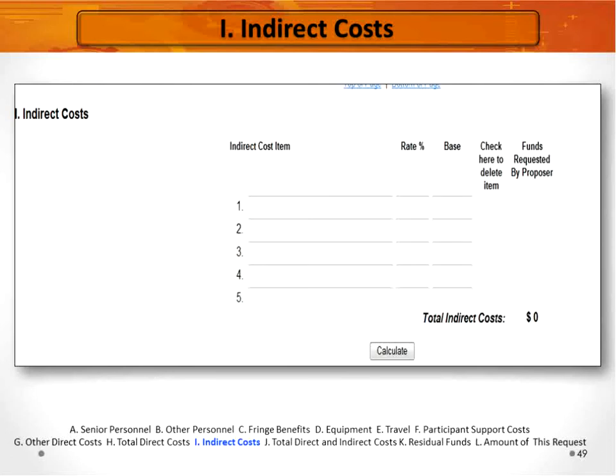One new to ATE college thought they were submitting a small grant for institutions new to ATE last October. However, after budgeting their project for the allowable $200,000 maximum grant amount, they mistakenly added their indirect cost on top of that amount. This kicked the proposal out of the small grants category during the NSF sorting process, and it was reviewed with regular project grants where it was not competitive enough to be funded and was declined.